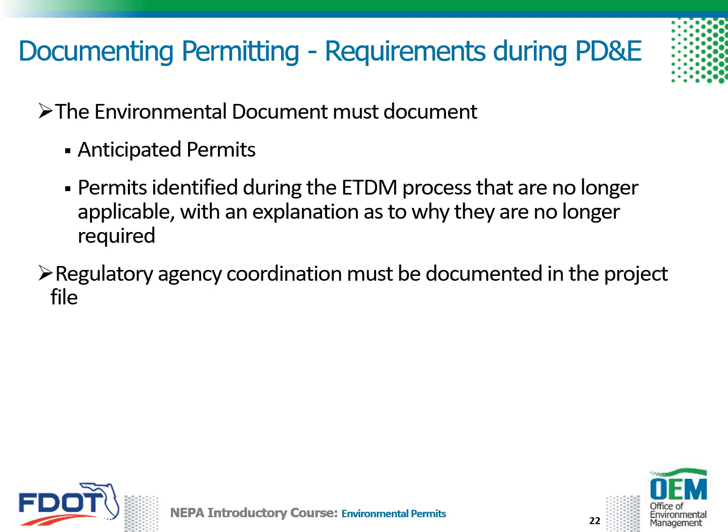The environmental document must outline anticipated permits. Permits that were identified during the ETDM process that are no longer applicable should also be included with an explanation as to why they are no longer required. Regulatory agency coordination that has taken place to date must be included in the swept project file.